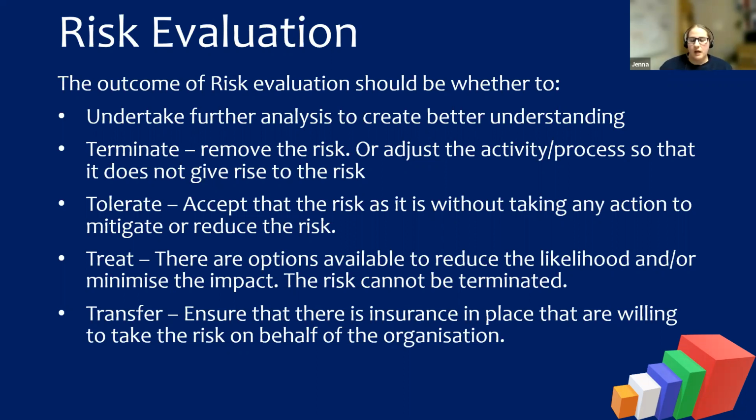I'm going to use staffing as an example again. I know that if I'm one staff member short, although that will have an impact, it won't dramatically change my ability to deliver a service. I can probably continue my service without having to pull someone else into those numbers. It doesn't make it right, but we can probably accept that risk.